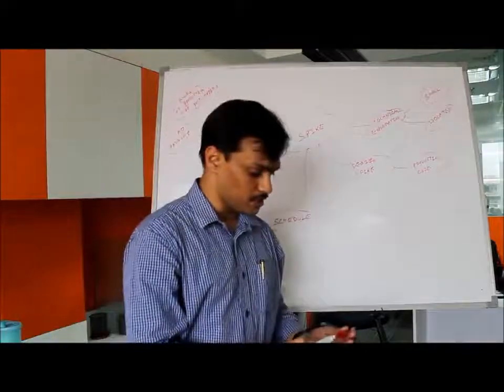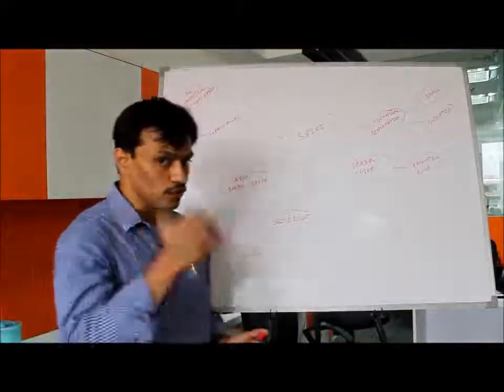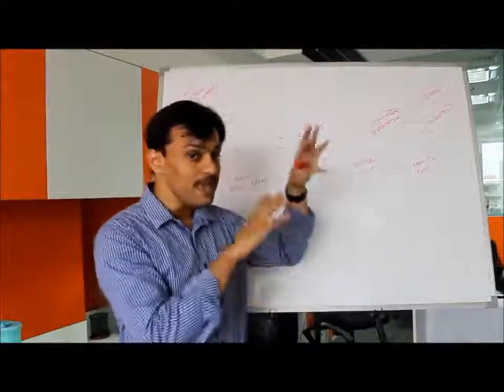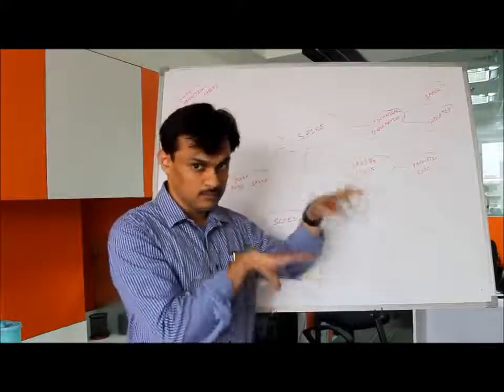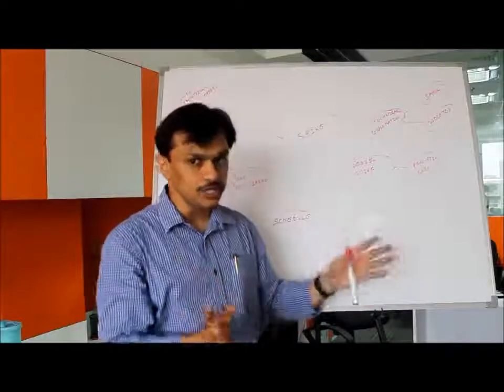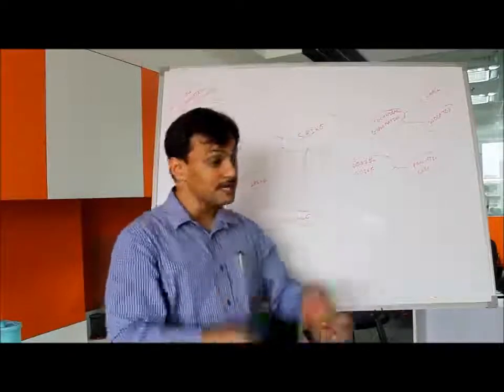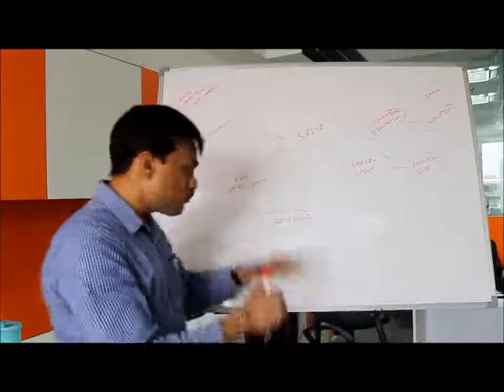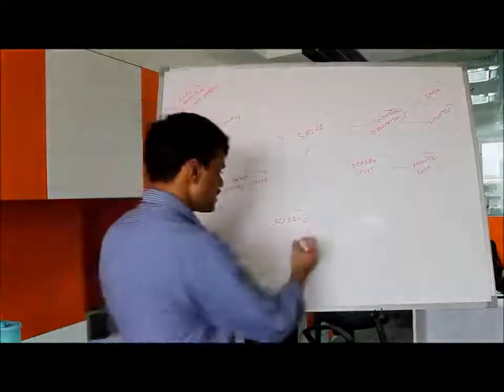If the spike is big, and if you relate to the discussion or the theory of epics, we may have a complex epic which gets split into investigation and development, and the investigation part of that complex epic is a spike story. So for bigger spikes, we may create a spike story.